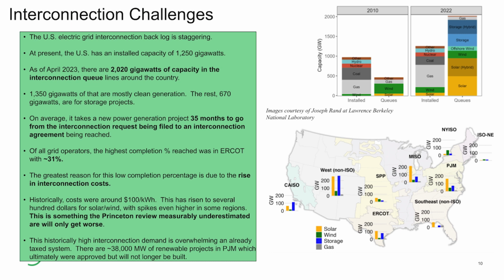Right now, it's about 35 months, about 3 years, just to go through that approval paperwork process to where they'll say, go ahead and get your shovels out and start digging, right? So that's just to say yes. Then you have to develop it, right? That's a 5-year project. You don't have the time to wait for some of this stuff to develop and mature. You need to be doing these things concurrently, right?